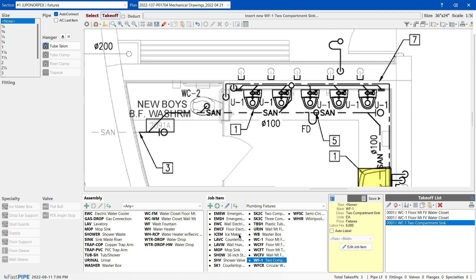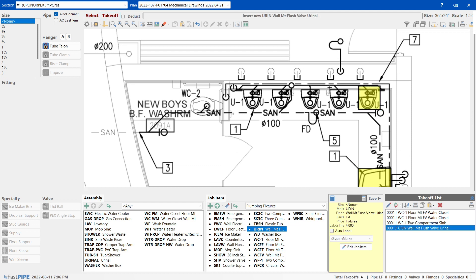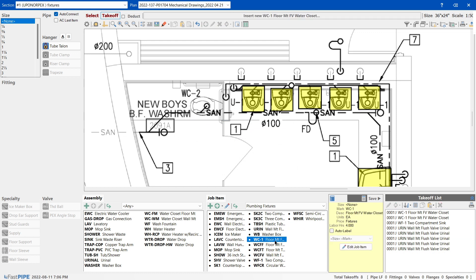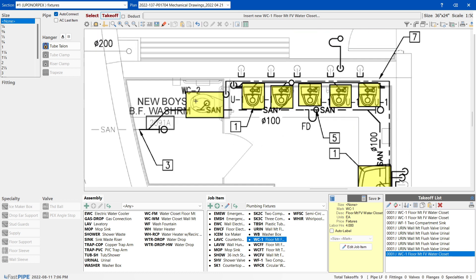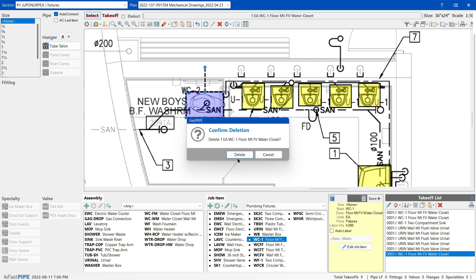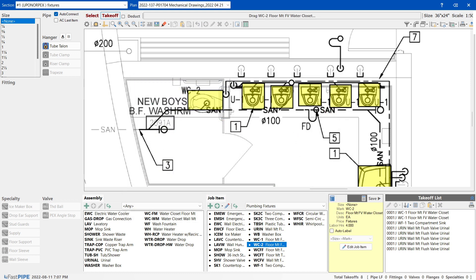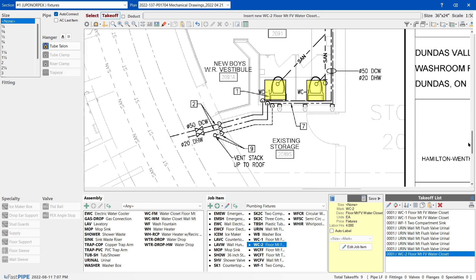Now this is also done. I'm going to go for a urinal and click on here: one, two, three, four, five, six. Now this is WC2 - what's the difference from WC1? I'll show you how we generate this information later. For example, WC1 toilet is over four hundred dollars and this toilet is two thousand dollars - you don't want them to be the same, you want them separate. So WC1 or WC2 is definitely a toilet but a different kind. I'll clone WC1, call it WC2, save it.